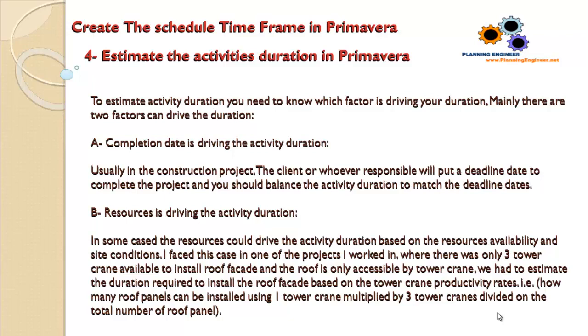Mainly there are two factors that can drive duration. First, completion date is driving the activity duration. Usually in construction projects, the client or whoever is responsible will put a deadline date to complete the project, and you should balance the activity duration to match the deadline dates.